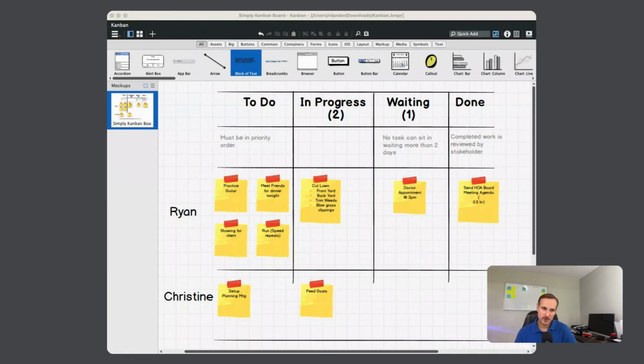In part 2, we talked about WIP limits, WIP, work in progress. On our example Kanban board, in our in progress stage, we marked that as a 2. So we put that we can have no more than 2 tasks or work items at any point in time in that column. That helps modulate flow going through the various stages of your Kanban board. And it also forces you or your team to finish work, complete work, before moving on to another task.